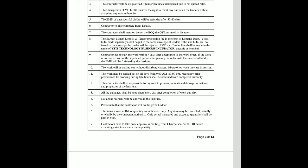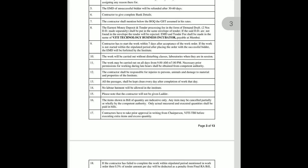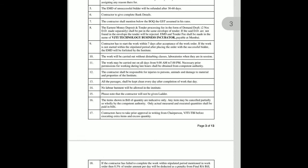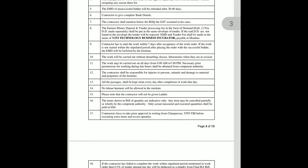The EMD of unsuccessful bidders will be refunded after 30 to 60 days. The contractor must provide complete bank details and shall mention in the BOQ bill of quotation the GST assumed in their rate. The earnest money deposit and processing fees are to be submitted in a demand draft separately. The ninth condition is that the contractor has to start work within 7 days after acceptance of the letter. The work will be carried out without disturbing classes when they are in session.